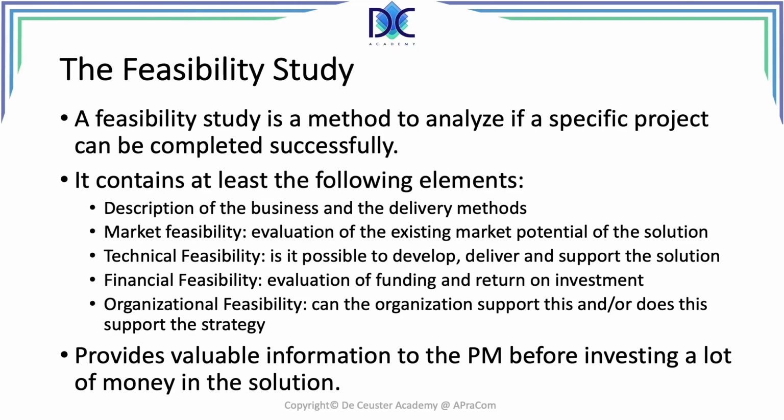A feasibility study is a similar method that can be used. It's a little bit different than the business case, but it's basically a method to analyze if a specific project can be completed successfully. It contains at least the following elements: the description of the business and the delivery methods, market feasibility, technical feasibility, financial feasibility, and last but not least, an organizational feasibility. The feasibility study provides valuable information to the project manager before